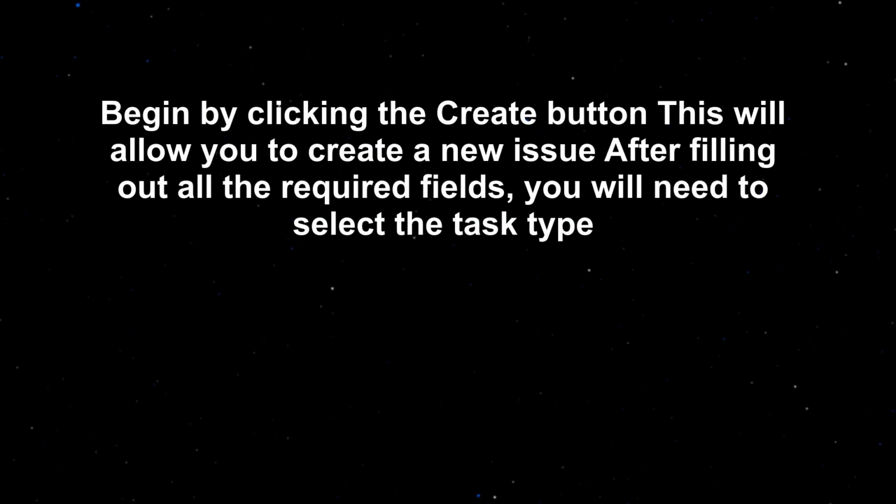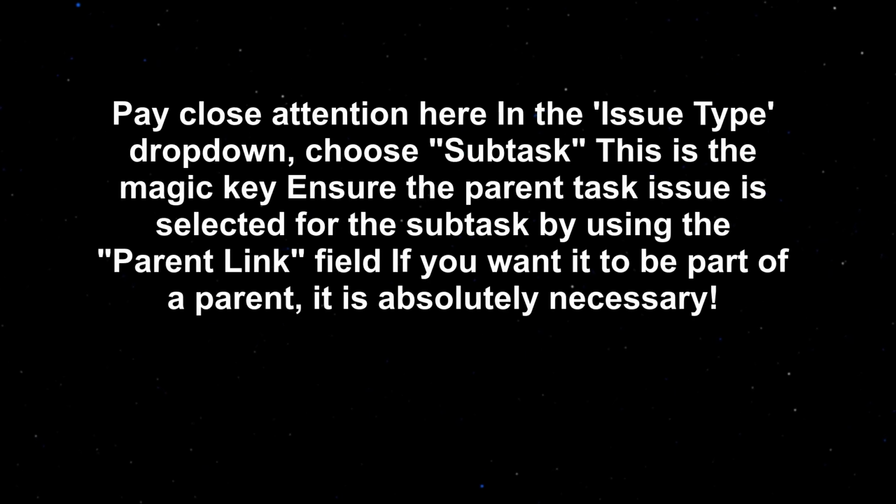Begin by clicking the Create button. This will allow you to create a new issue. After filling out all the required fields, you will need to select the task type. Pay close attention here in the Issue Type drop-down. Choose Subtask. This is the magic key.